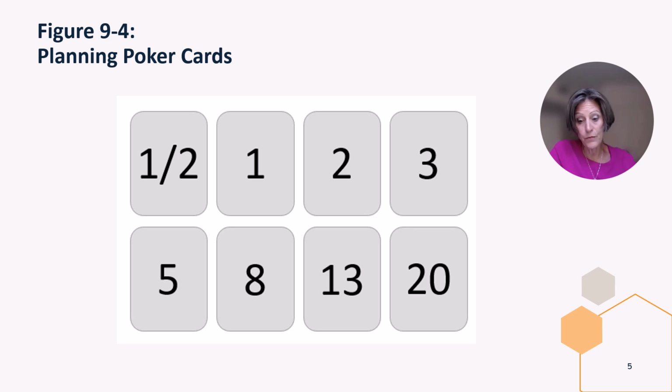Foundational to estimating effort for a sprint is that the product owner provides full explanation of the user stories and acceptance criteria, and that the team members can honestly assess the necessary effort to complete the deliverable. For example, a user story that scores a 2 should entail twice the effort as a user story scoring a 1. Scrum development teams work with the product owner and Scrum Master to ensure that the number of user stories designed and assigned to a given sprint can be completed.